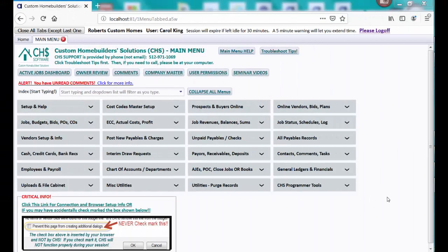Hi everyone. In this video, I am going to talk about how to set up the backbone of a job costing program like CHS. In order to compare costs from maybe your job bids from your vendors or subcontractors or suppliers to the budget, or select for the budget, and compare to purchase orders or committed costs that you're issuing, compared to change orders, and to post actual job costs against those so that you can compare them across the board on something that you're changing daily, estimated cost and completion, and showing how much over and under you are. You need something to use for all of those so that we can compare those.